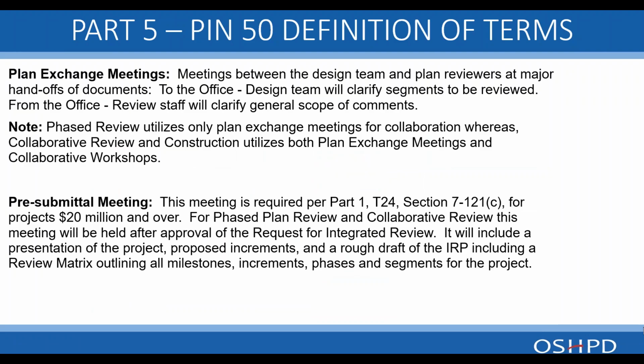Plan exchange meetings. Plan exchange meetings are meetings between the design team and plan reviewers at major handoffs of documents. To the office, the design team will clarify segments to be reviewed. From the office, the review staff will clarify to the design team the general scope of the comments. These typically are a 1-hour meeting between like disciplines. Note that phased review utilizes only plan exchange meetings for collaboration, whereas collaborative review and construction utilizes both plan exchange meetings and collaborative workshops.